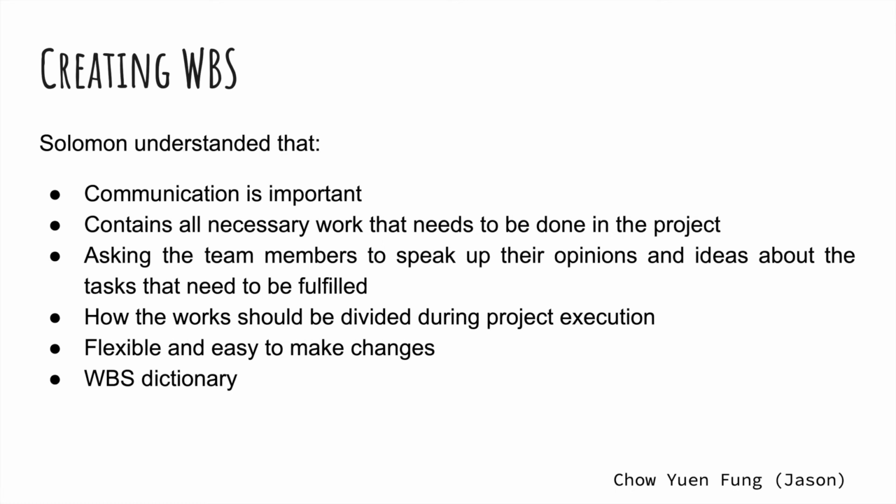As Solomon knows that communication is crucial, to ensure the work breakdown structure is defined properly, he started a project meeting with all the team members involved to discuss it. During the meeting, he kept asking the team members to speak up with their opinions and ideas about the tasks that need to be fulfilled, how the work should be divided during the project execution period, as well as the responsibility of each individual task.